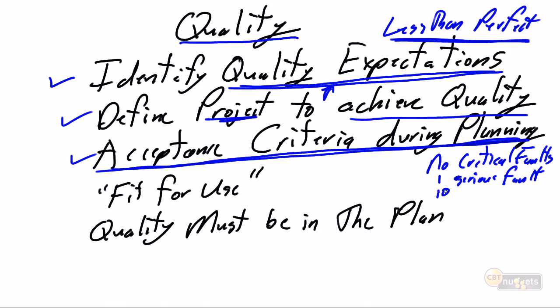These must be repaired before I move in. And I'll accept the house if there's no more than 10 minor faults. So again, if the baseboard is missing, if there's 2 paint chips and there's a single drawer pull missing, yeah, I'll accept the house provided you get them fixed. But if every bedroom has faults, and by the time we're done the inspection, we have a laundry list of 35 things that are minor faults that need to be fixed, we're going to begin to seriously question the integrity, the workmanship of that home. And again, we're probably not going to accept the home if there's 35 of these minor faults.